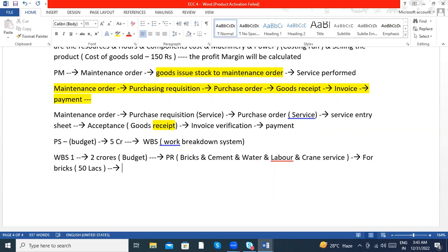So in the project system, when you are allotting budget, you also need to cross-check how much budget as of now is spent on this WBS element. If it is exceeded, then you need to go back and check with the project system team, and the higher managers have to release the budget again.